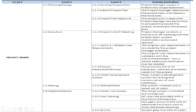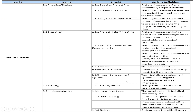Project breakdown into levels provides activity definition. Level one is the project name. Level two includes the phases: planning, design, execution, testing, and implementation. Level three includes activities within each phase — for example, under planning you have 'develop project plan' and 'submit project plan.' The activity definition specifies who does what: for example, the project manager creates a preliminary scope statement, and for execution, the project manager holds a project kickoff meeting.